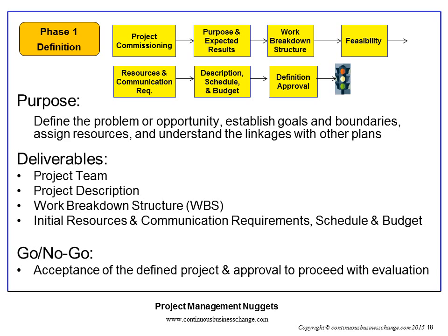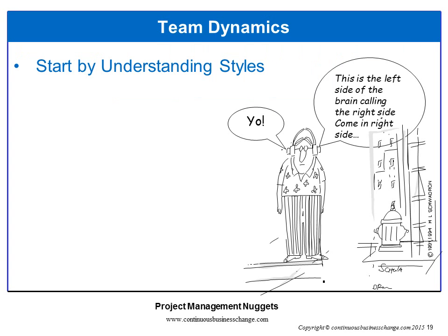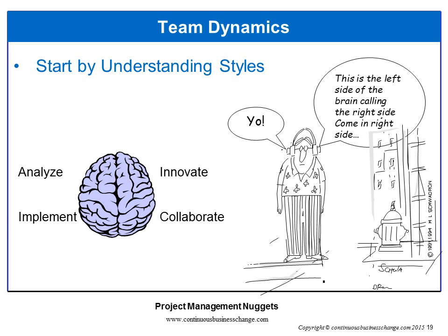The key deliverables of the phase include the project team, project description, work breakdown structure, initial resources and communication requirements, schedule, and budget. Develop your project team by understanding each member's thinking, communication, and learning style, including your own.